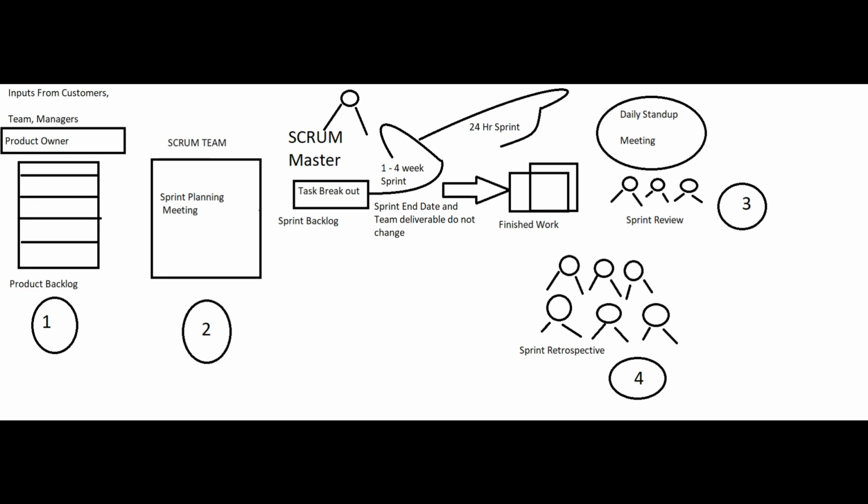Then we are going to mention some effort estimation time. During this effort estimation, we can consider how much time it takes for designing the test cases, for executing the test cases, and, after executing, if you have any defects, how much time it is going to take to resolve them. After that, we are going to generate some reports and review. These are all the effort estimation times we mention, and then we provide all this information to the Scrum Master.